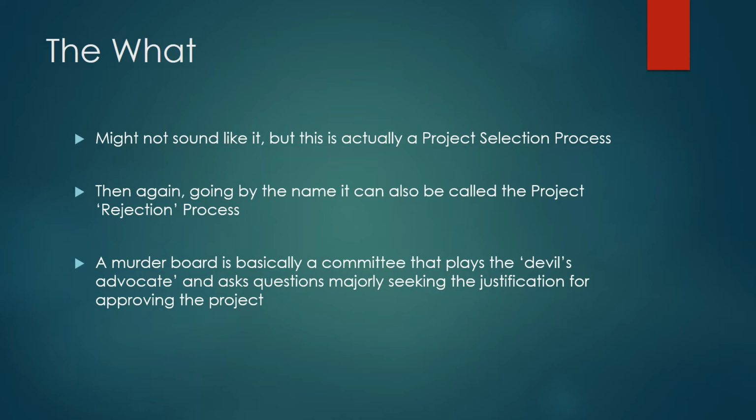So again, what is it? A murder board is basically a committee. That means there is a group of people, and all of them play the devil's advocate, and they ask questions majorly seeking the justification for approving the project. They'll question everything in the project. They'll ask hard questions. You need to justify that your project is worth it, and they'll ask every question they can think of to reject your project, because that is their job. They are playing the devil's advocate here.